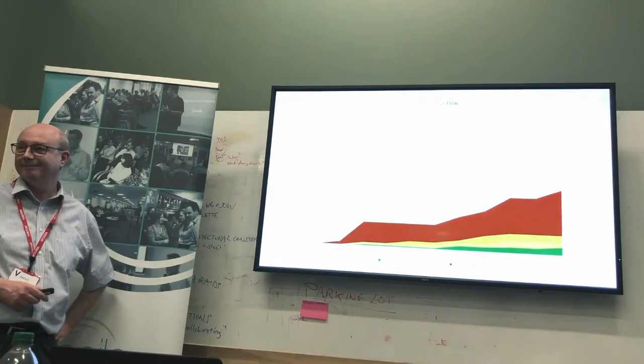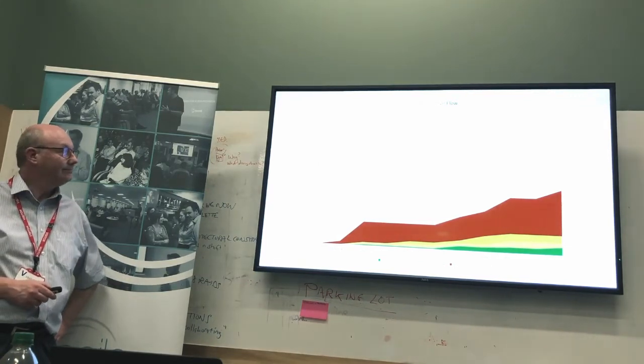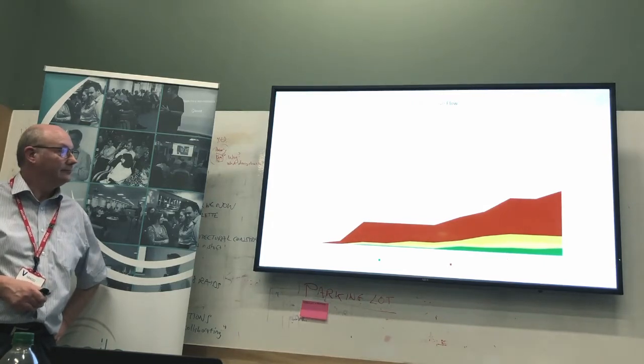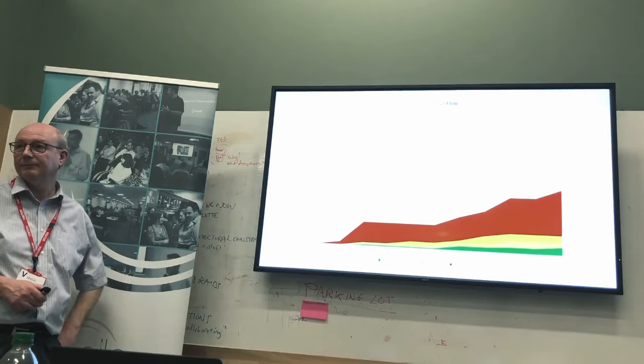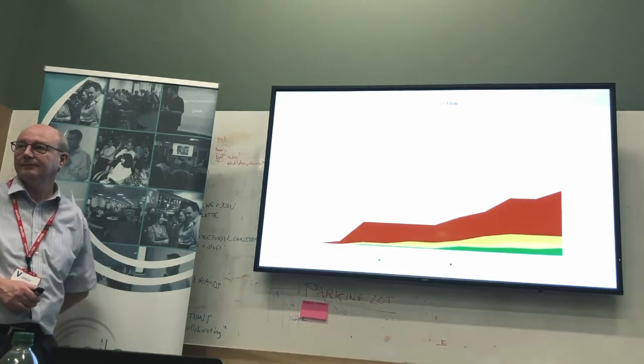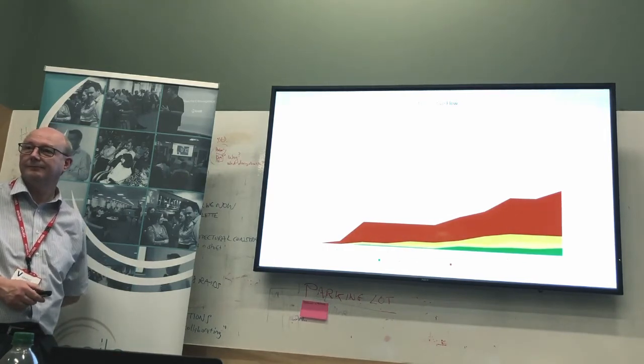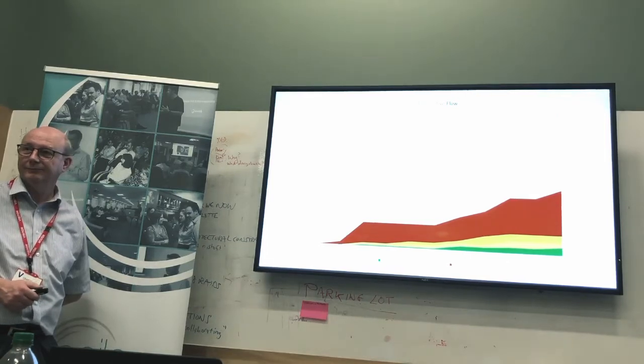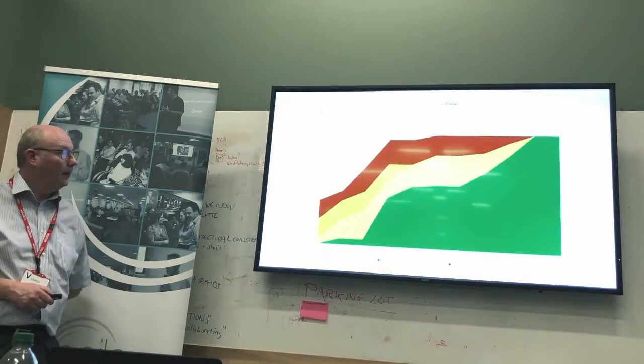It's that kind of top level of just self-managing, and whatever that next level above that is essentially. Well, I think the whole purpose is the whole team's responsibility. Product owner is accountable for the product backlog, but he can delegate to a BA, to the team, the development team. If they're not doing it, then the Scrum Master fails with regards to what's meant by a product backlog, and it should be ready for the next sprint.